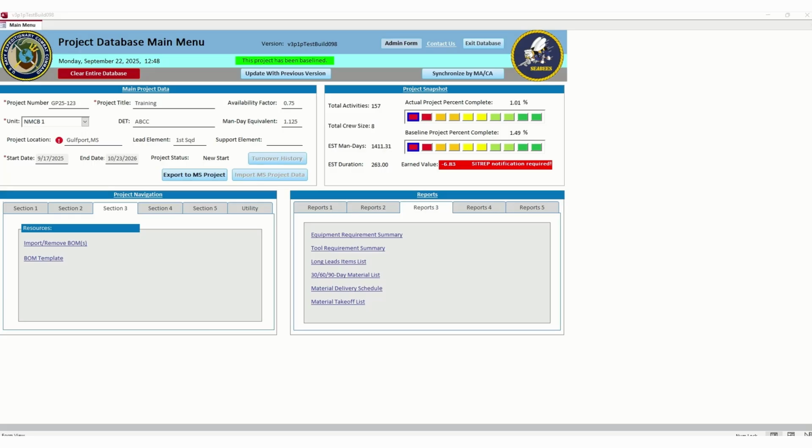All right, so that is some ways to see things in projects, as well as being able to correct some of the information. Again, you don't really have to mess with the days. The days are based off the calculations. Just set your dates as needed. If you have to force a date, then you're going to put a constraint on that task, so be aware of that.